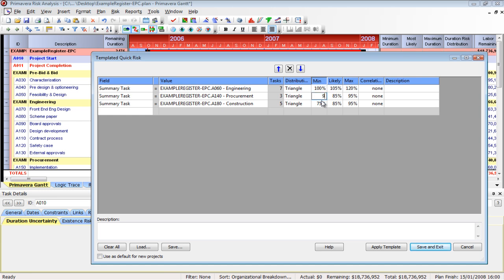Same thing, we go to procurement and say, well, it's random vendors. Everything is plus or minus 10%. Maybe we'll look at a couple long lead items offline, but for the most part, our process is okay. We're not going to have too much deviation from what we've scheduled in. Construction, we're up front in the process, so we haven't gotten all the contractors on board. We don't have the detailed construction schedules. Maybe we put this as a worst case. So, there's no way we'll go past our values that we put in. Maybe I've got some optimistic ranges there.